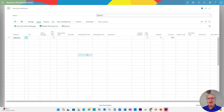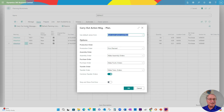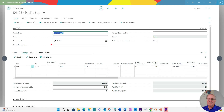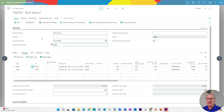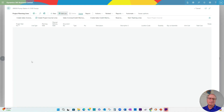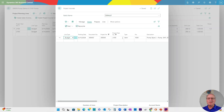When I go ahead and do that, I see I've got an insufficient quantity for some of the items on that assembly. This is easy to fix — I'll run a quick planning worksheet to get that information in an MRP process and create the purchases and receive those. These are the items I need to complete those final assemblies. I'll select the ones I want to create and carry out the action messages — this will create the purchase orders. Then I'll go ahead and receive those in and post that journal. Here's one of the purchase orders — I'm just going to go ahead and post that. Here's a second purchase order and I'm going to go ahead and receive that as well. I can go back into the planning line, open the project journal, and go ahead and post it.